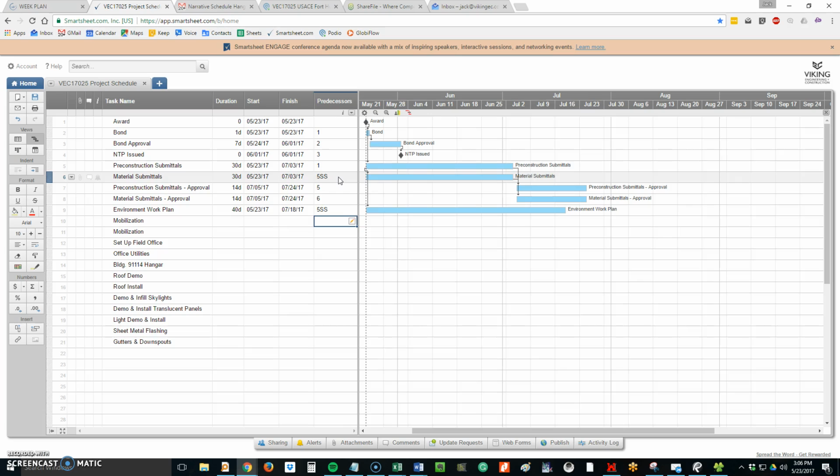And then we're going to put in a mobilization. He's saying it's going to take 5 days to mobilize. And this one's actually going to be set in stone. We're not going to make it a predecessor. We're going to say they're going to leave on July 6th after the holiday, and they need to travel. Okay. So I'm going to say mobilization.